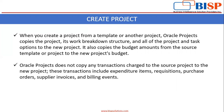These transactions include expenditure items, requisitions, purchase orders, supplier invoices, and billing events. Project templates are the ones that you use in every project, so it does not copy any of the transactions in which those templates are used.